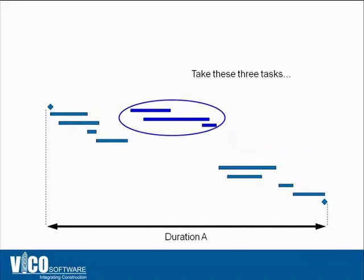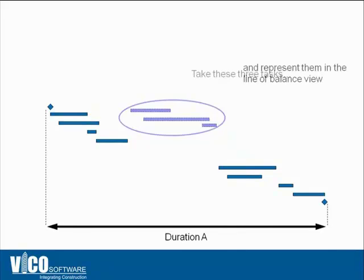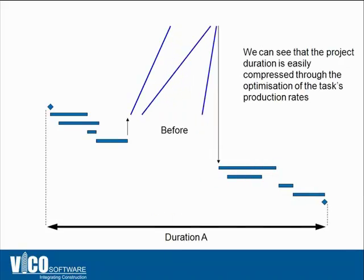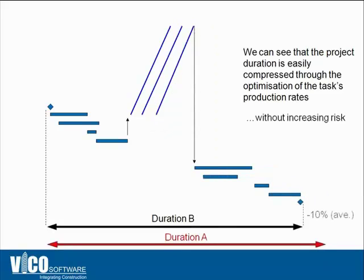When you look at a Gantt chart schedule and transform three activities into Flowline, you can see that the task in the middle has lower productivity and slower utilization of locations than the activities at the beginning and end. By synchronizing the production rate and utilizing locations at the same pace, customers experience approximately 10% compression of the schedule. Using this additional dimension of locations together with productivity, you can optimize the schedule and compress it by at least 10% on average.